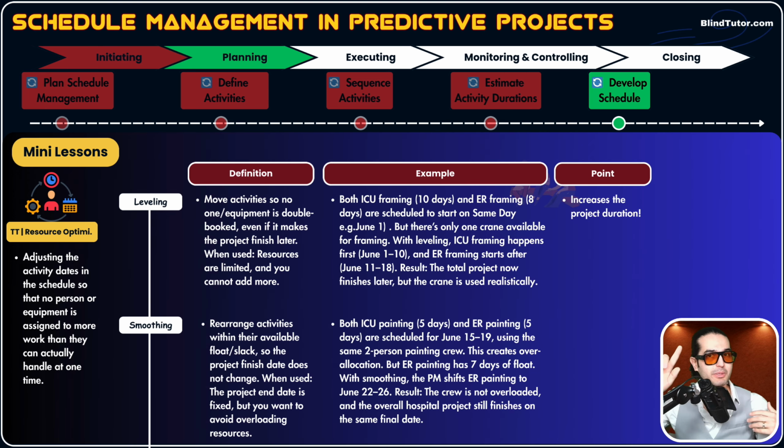And remember, if you're saying they can do part-time, no. Because if they do part-time, instead of 5 days it will take 10 days, so again our schedule will be affected. So we consider full-time, guys. Don't be smart and say, hey, Nav, why don't they do it part-time and be available at 2 places? Now, this creates what? Over-allocation, overbooking. When one resource is booked for 2 activities at the same time, it is called overbooking, over-allocation, and we don't like it, guys. No, no, no, no. This is a resource problem.